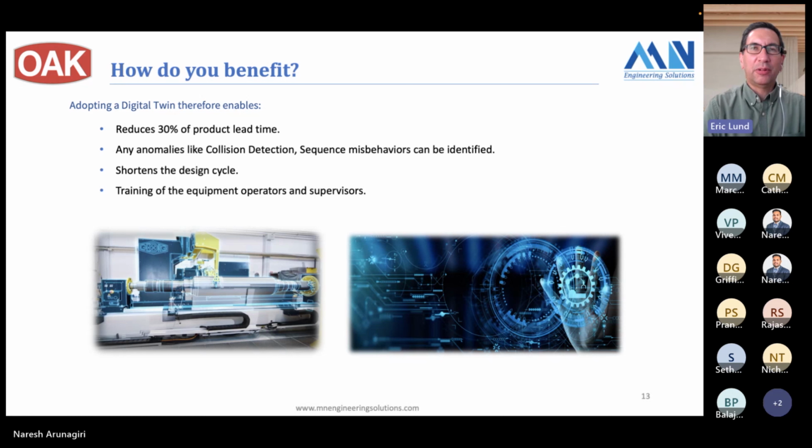The other portion of where you're going to save and reduce lead time is to make sure that you're using that digital twin as early in the design process as possible. We want to make sure you're using it during the design cycle when your machine or your project is still on paper. You want to use it during the manufacturing process. At Burr Oak Tool, we machine our own parts, so we want to do it during that portion too. And then of course, we want to save time by testing all that software during the assembly process when our technicians are building the machines for us.